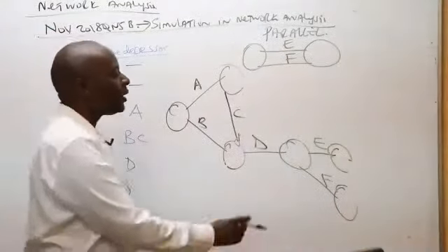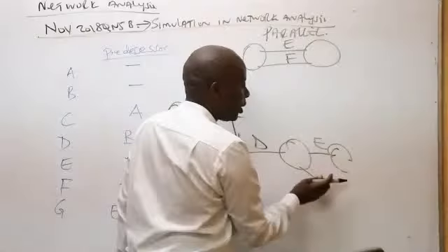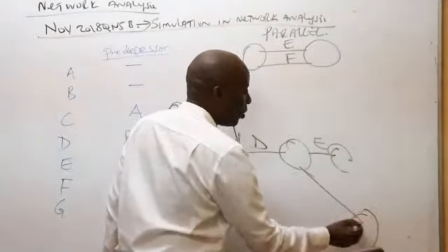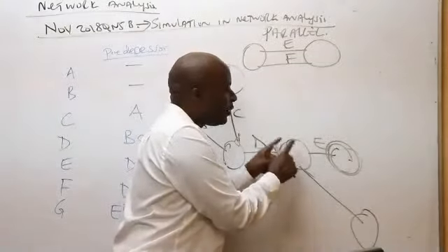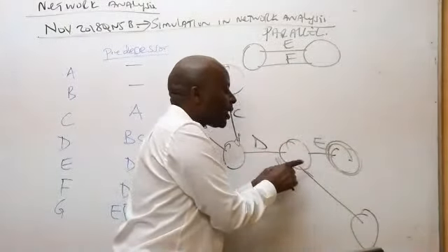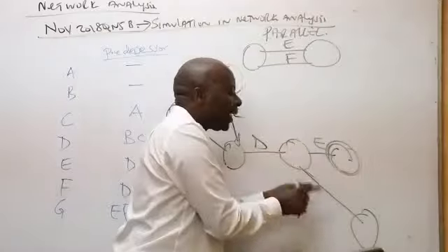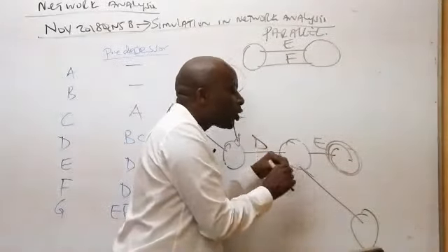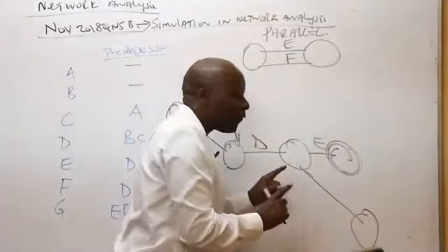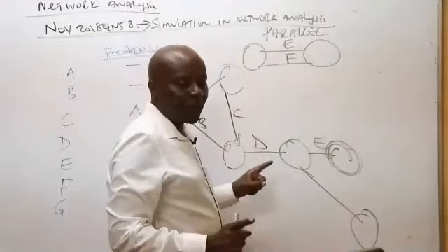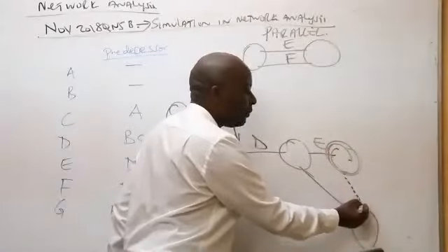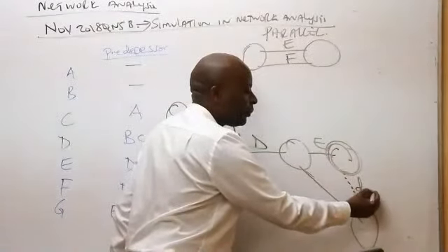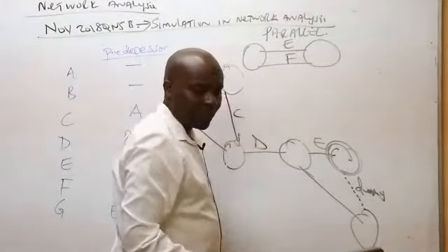So, ladies and gentlemen, here then the only thing that I need to do is to come and make F a little bit longer and then ask myself, if these activities here share the same start and they can't share now the same end directly, then they can only share the same end in a fake manner. The fake manner is what we are seeing students calling a dummy, which is a dotted line. A dummy, like that.